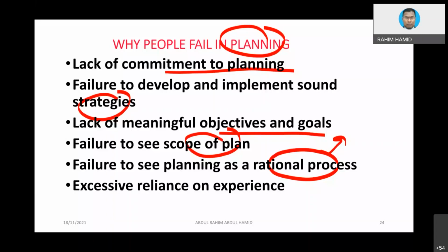Why? If you go for a site visit, then only can you understand, oh, the site condition is like this. The issue is that the information shown on paper does not reflect the whole area surrounding the project. And then you go to the site, and you notice that, wow, there's a big swamp area adjacent to your workplace. In order to get into your workplace, you need to build a lot of what we call embankment for the access road.